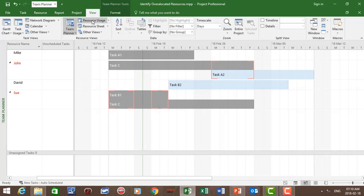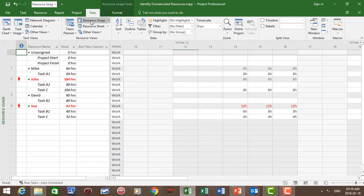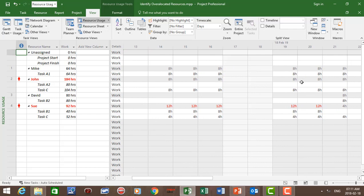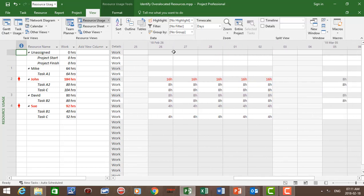Our next view is the resource usage view. Let's click on resource usage. In this view we can again see John and Sue are over-allocated. Sue is over-allocated on the 14th, 15th, and 16th of February, and the 19th and 20th, with a 4-hour over-allocation — 8 plus 4 equals 12 hours, but the working hours per day is only 8 hours. For John, he is over-allocated on the 26th, 27th, and 28th of February, and the 1st and 2nd of March, with an 8-hour over-allocation.